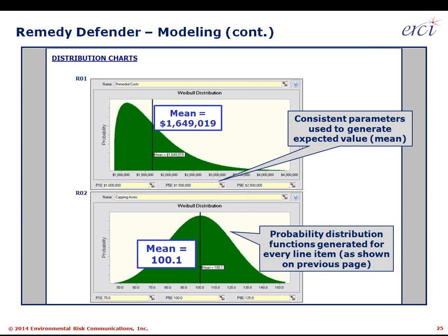That number takes a little bit of reminding to a project user team that a P50 is not a weighted average. A P50 is just simply a median. There's no other definition for it. However, we're after an expected value. The best number that we're after is not the median value, is not the P50 value. The number that we're really after is the arithmetic mean, the weighted average, the expected value. All of those terms mean the exact same thing. And we're after that number, that's the 1.649 million. We use those other 3 to get to it.